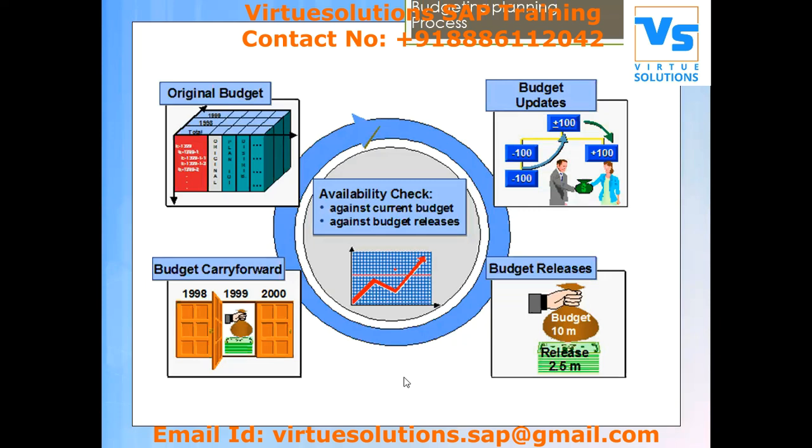That is under this budget management. If you want, you can carry forward those budgets. Suppose this year you got some budget, and maybe some is still there. Maybe the entire budget is not utilized. The remaining budget, either you can transfer back to your organization, or you can carry it forward to the next financial year. That is up to the project managers, whether they want to keep that budget or carry it forward to the next financial year.